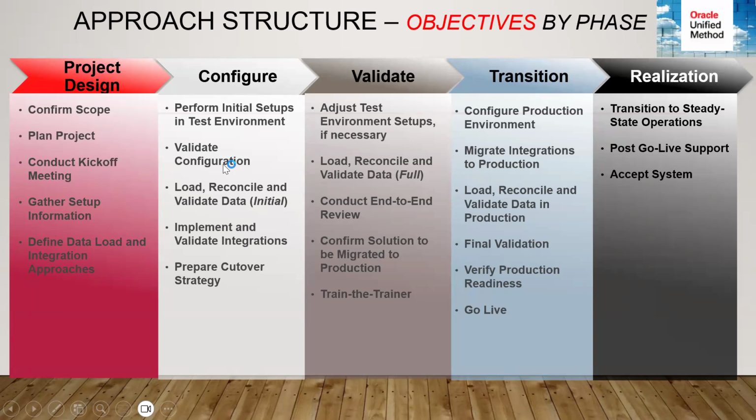In most cases, 90% of projects, clients would be moving from a different ERP. Let's say currently I'm working for a client, Dubai Holding, where they are moving from Adaco to Fusion. In that case, we have data migration activities where all the data, which is nothing but their items, on-hand items, blanket purchase agreements and purchase orders, will be moved from Adaco to Fusion.